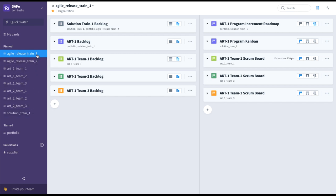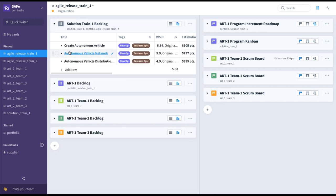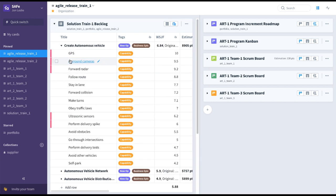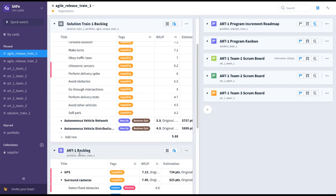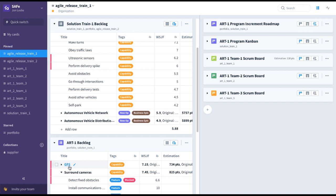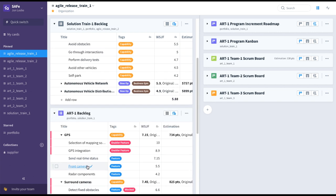To each of the Agile Release Train or program-level collections, we've added this solution train backlog, which has our various business epics broken down into capabilities. Those capabilities, such as GPS, are feeding the ART-level backlogs. So here you can simply drag and drop GPS down to the ART-level backlog, which is in turn broken down into features.